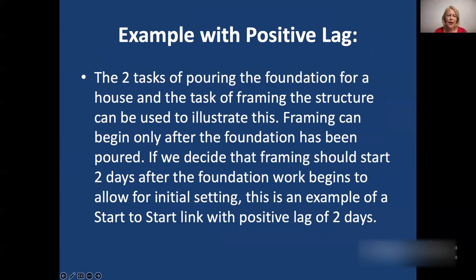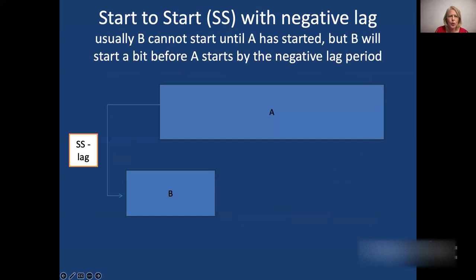But we could decide that the framing should start 2 days after the foundation work begins to allow for initial setting. So a little bit of setting of the concrete, a 2 day delay, can decrease the risk of cracking and so on. And this is a good example of a start to start with a 2 day lag, positive lag or delay.